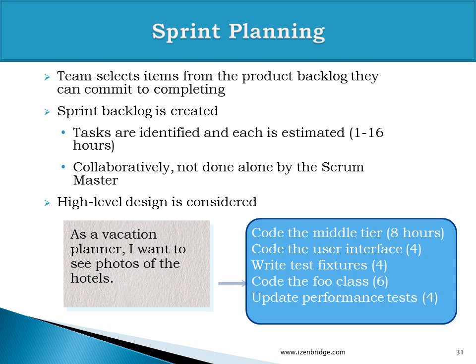For example, we have a story: as a vacation planner, I want to see a photo of the hotel. This story may need to be converted into coding, user interface designing, writing test fixtures, classes, updating performance results, etc., etc. And all these tasks need to be estimated in the form of ideal hours.